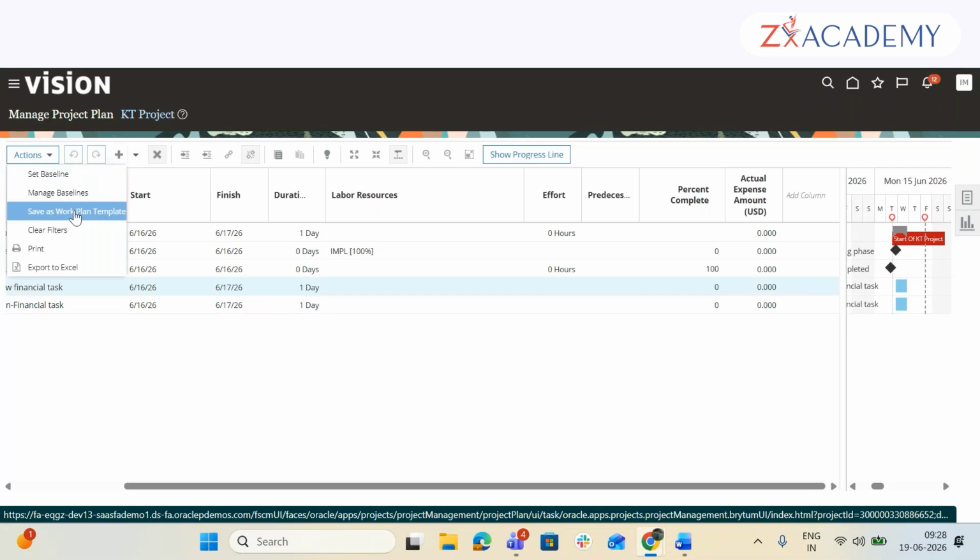So baseline, if you have worked on project financial management, whenever you create a budget, it's in the working status. That is, I'm still working on that budget, maybe the number of hours. Whatever changes I need to do, I'm still working on that. And once you complete your things, how does the system come to know that you are not still editing it, that whatever changes you wanted to do, you are done with that? So the system comes to know from a word called baseline.